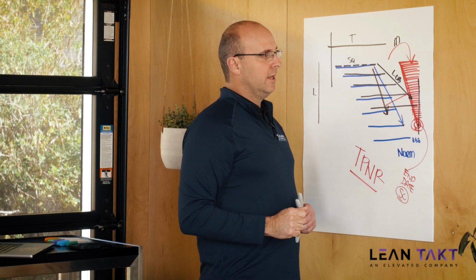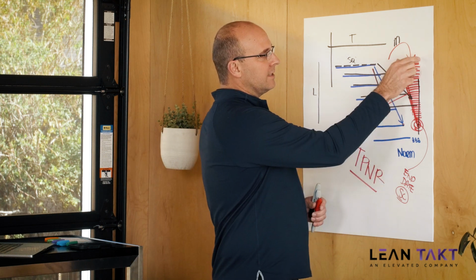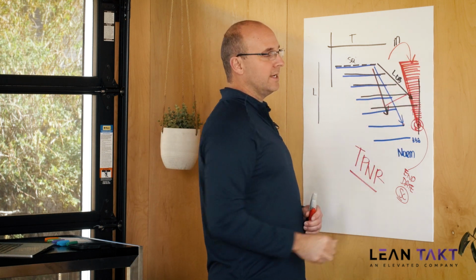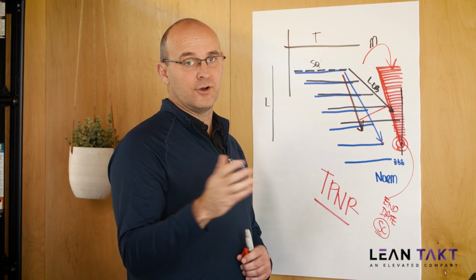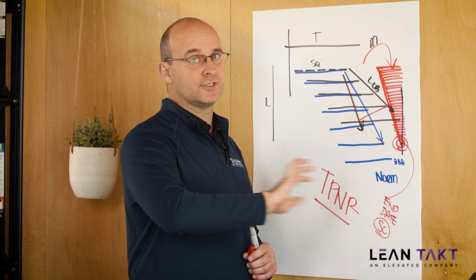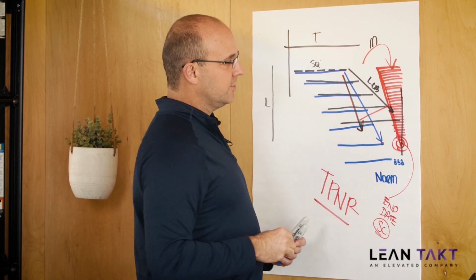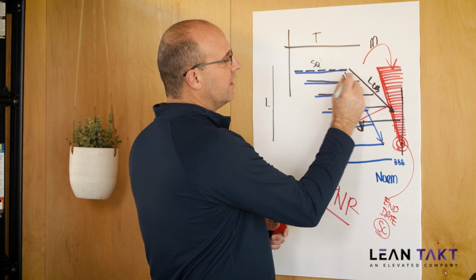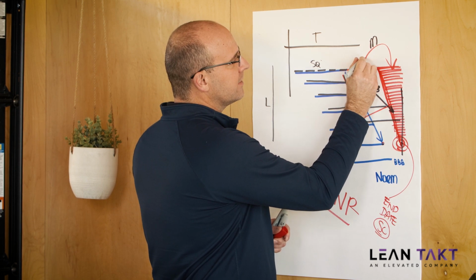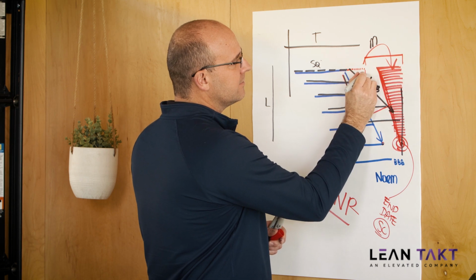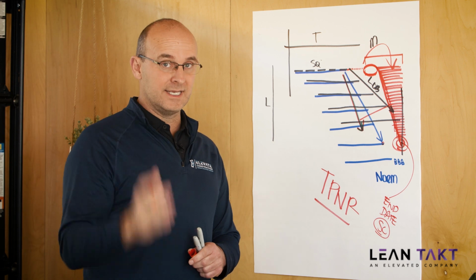So here's why I really like the takt point of no return. I don't like this being just a blank open space so people think, oh, I've got plenty of time. Because then that incentivizes people to think, oh my gosh, I can just push things to the end, delay, procrastinate, and still finish. No, you can't. So I want people to see, hey, let's say your activities got delayed and you pushed. I don't want them to think, oh, I've got this whole space. I want them to see, oh my gosh, that's what I have right there before I really get into trouble.